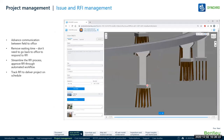In the same way, if I'm reviewing RFIs or issues that have been raised, I'm doing that through a simple web browser. I can relate the RFI specifically to a point in the model both geographically and on a time basis — for example, to a specific pile cap at a certain point in time on the project. I complete the data with basic details, add comments, and attach photographs. And of course I get a full audit trail, so I can follow what's happened to that issue from when it was first raised to when it was closed out.